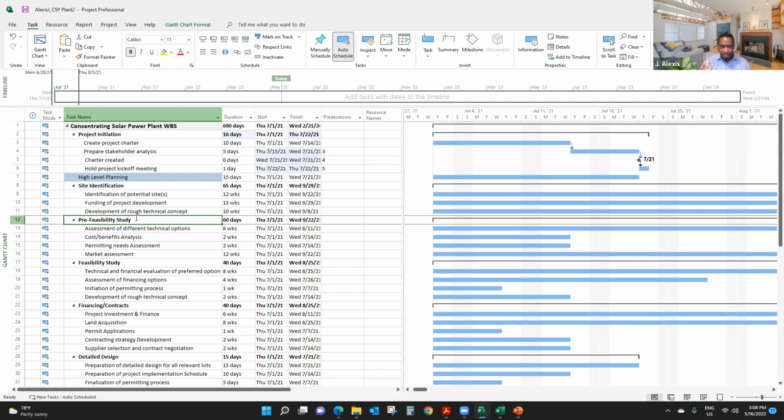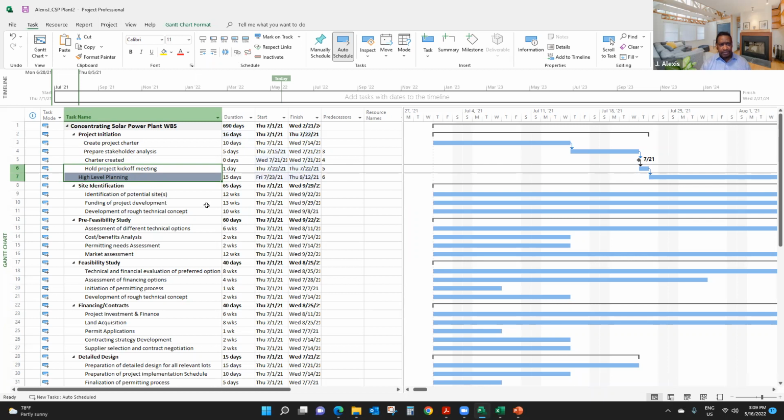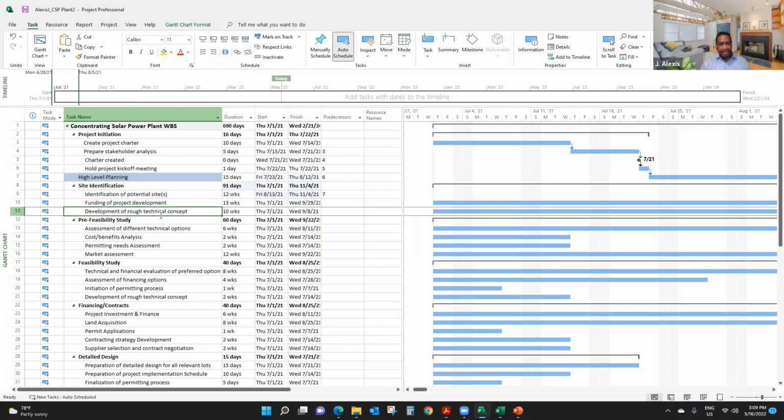So I'm going to stop here in a minute before I copy the links, because I can just select things and link them. For example, here, I can link those two activities by selecting the first one and the second one. Here, select them, task, and link, right? And to link this one and that one, I'm not going to link any summary tasks. I'm going to link this one and the first activity here by using the control function. I select this one, control, select this, and then I link them, right? That's how I link this.